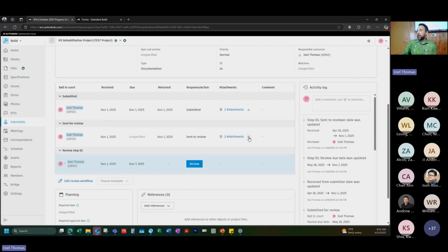I'm going to look here. I'm going to see the attachments they've added. It looks like we've got an XER file. When you see that, it's a P6 raw file. If you see the .mpp or .xer, that means it's an actual raw schedule file, which is good. That's what we want. So I would download both of these.